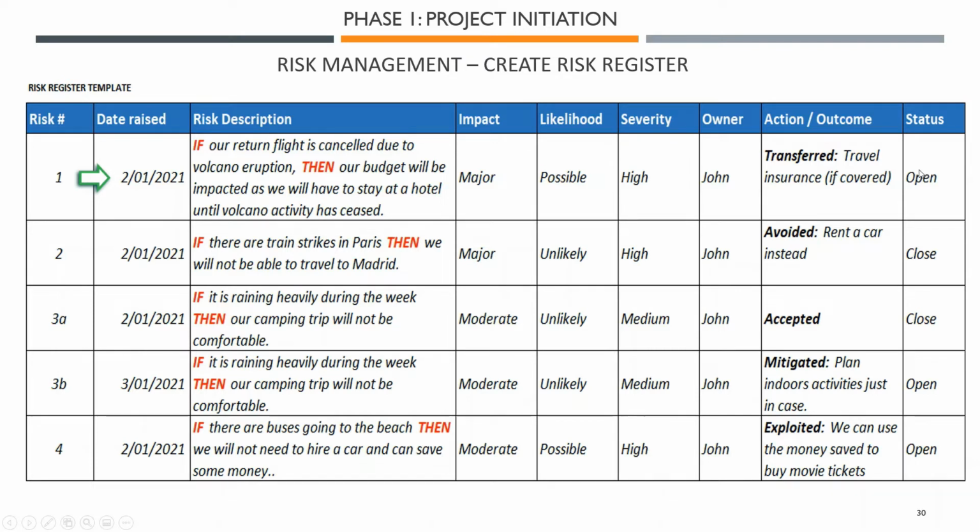Like for the issue log that we will see later on, you need to make sure that someone actually owns the risk, monitors it for you, keeps an eye on it for you, and is ready to action if the risk takes place. That will be reviewed also as part of the risk roles and responsibilities. It's very important to have a stakeholder responsible for each of the project components.